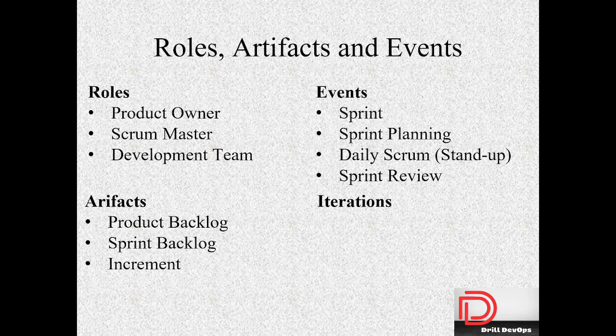If someone inside the team takes emergency leave, or any individual has personal or medical emergencies, whenever they take it, those items will be in the pending state, and they are going to carry over to the next sprint as well. This means the team's sprint backlog may change or evolve based on the requirements, the bandwidth, the dependencies, and the team's commitment.